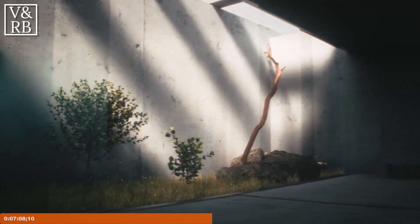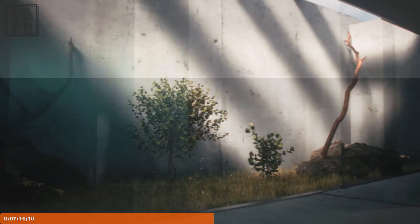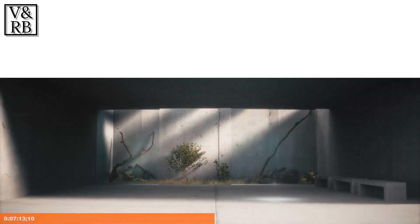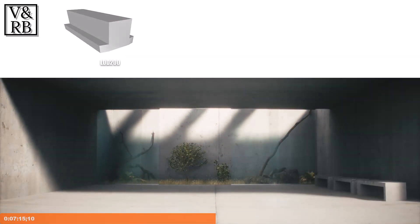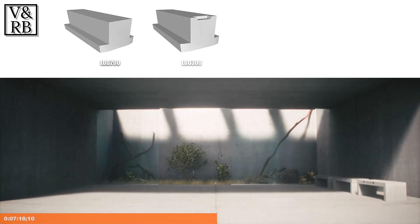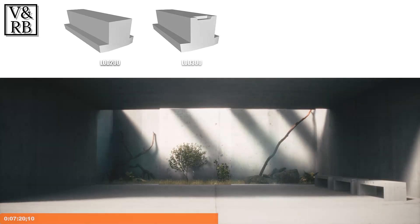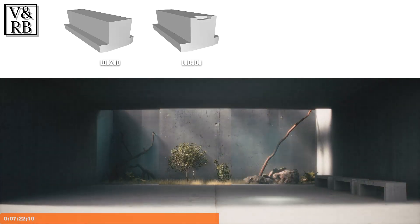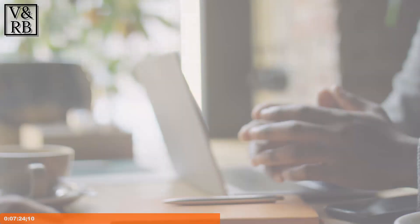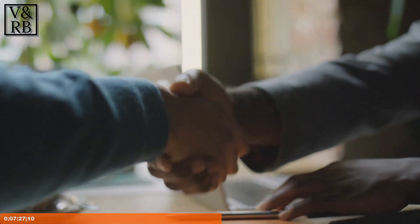The architect is initially responsible for their spatial coordination in the design, while the structural engineer guides the sizing of the elements until they reach LOD 300. Achieving LOD 300 means the superstructure is fixed with the coordinated size and location of all elements, and allows for a responsibility handover between architect and structural engineer to take place.